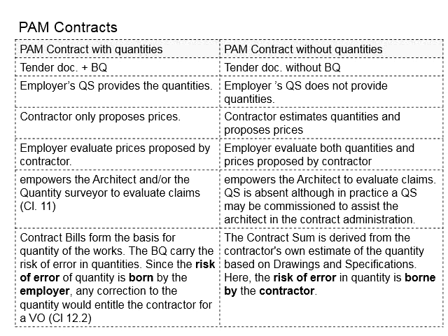More specifically, we are talking about clause 11 as well as clause 12, that appears in the PAM contract, reflecting the differences in terms of the roles of the quantity surveyors. We talk about clause 11 related to the claim given by the contractor. This represents the progress claim, which normally happens throughout the construction project upon completion of the work by the contractor. There will be another part that might involve the claim, which is known as the VO.